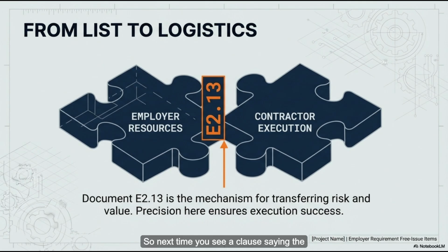Without a doubt. So next time you see a clause saying the client will gladly provide the materials, do not celebrate the cost saving, look for the Incoterms. Check the delivery dates and ask yourself, am I genuinely ready to be completely responsible for equipment I didn't even buy? And if the answer is no, you better make absolutely sure that drafting note gets changed before you put your name on the line.